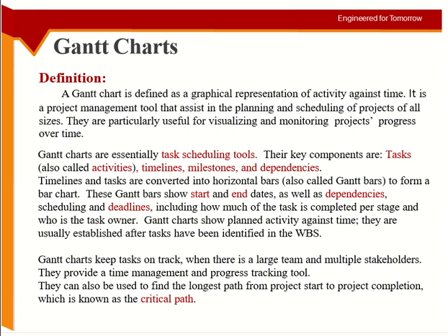So I may have a milestone which is the end of Ramadan, because after Ramadan I will have the break, or I may have a milestone at the start of Ramadan, because in Ramadan my activity hours will change. So the milestones can be because you finished a specific stage of the project, or the milestone may be set because something happened outside the project which is important for the project as well. Like I gave the examples.